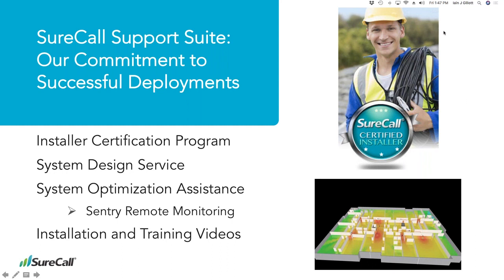So everybody who's on this call, who's in new building construction in major metros, public safety has to be a part of your plan from the ground up, before it even goes into the ground. Because again, that could stall your business. It could stall the opening and cost exponential dollars on the back end if you're not ready to go on the go-live date.